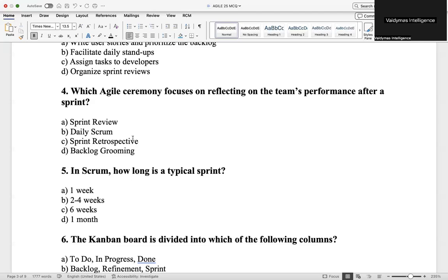The description of sprint review isn't correct, sir. Okay. You said sprint review is when we look at the work and assign the roles to people, right? That is sprint planning. Sprint planning, before the sprint starts. That is when we assign the work. Now, sprint review is when we review the work that was done, the deliverables.